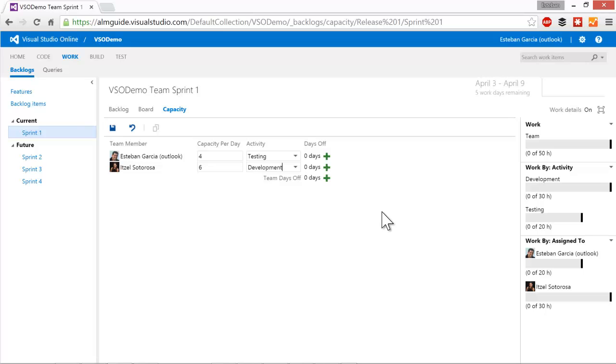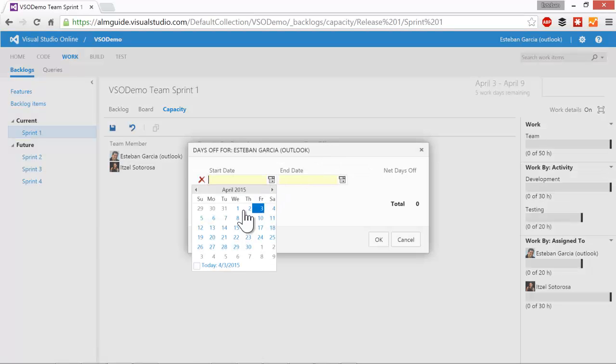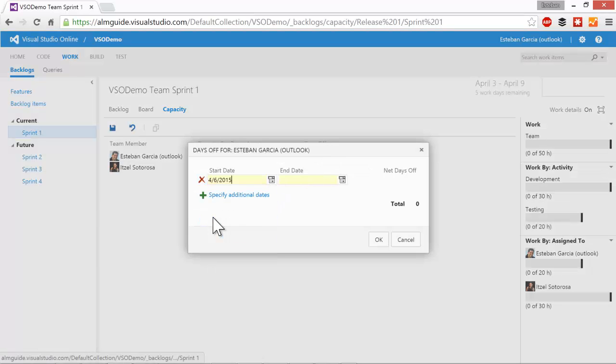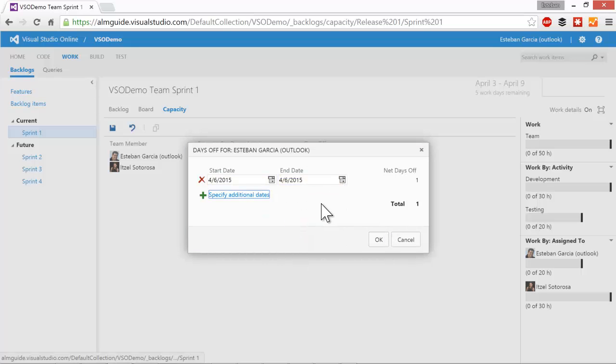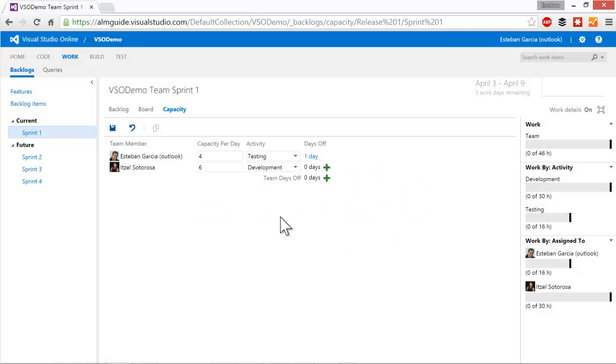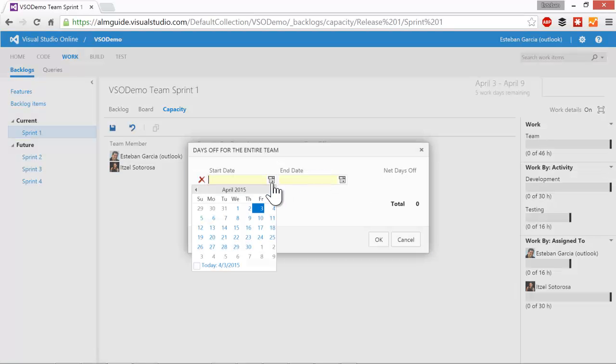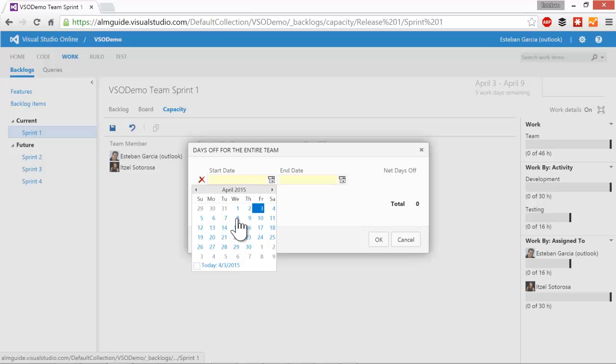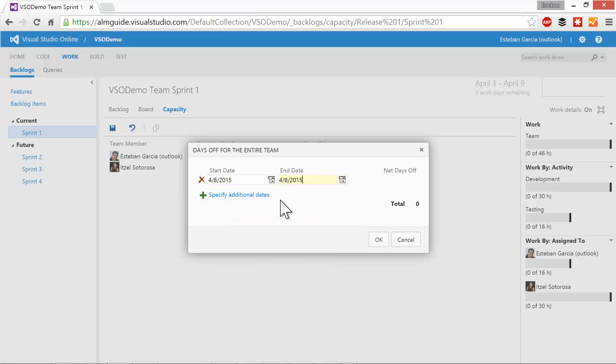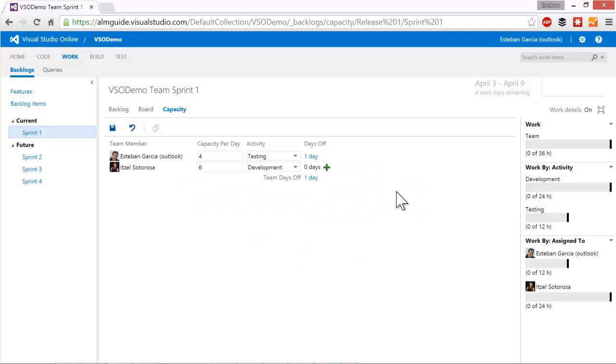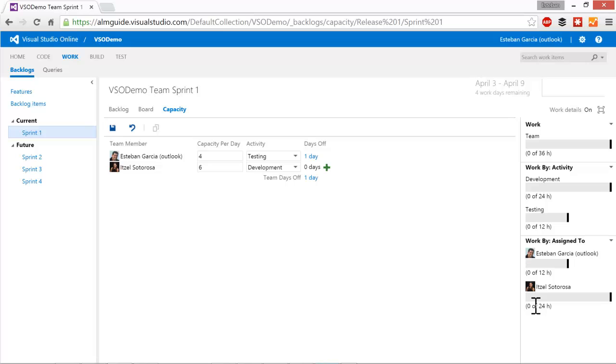Now, I'm taking a day off next week, so I'm going to mark one of the days as off. And let's say that Monday is going to be my day off, Monday through Monday, just one day. And when I tap away from that, you see that the total shows there's one day. Now, we also have a team outing next week, so we have a team day off. I'm going to click on the plus by the team day off section. And I'm going to select next Wednesday as a day off for the whole team. Starting and then the same day, just like before, one day, and click OK. You can see on the right hand side how the capacity that is specified for each team members and the days off gave us the actual team capacity. So I can see how much time the team is available, how much development time we have, how much testing time we have, how much time each person in the team has available for this sprint.